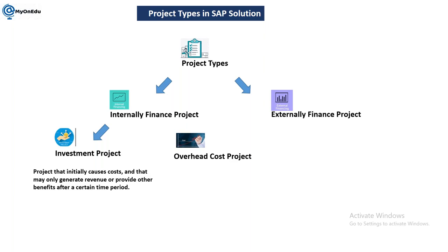When we are understanding whether this project will be successful or not, it is based on some factors. You will calculate the NPV, you will calculate the payback period, you will do complete pre-investment analysis, ROI, and only then will you say, yes, this project is useful for us. In this kind of project, you will not have any customer, no initial revenue, and here periodic capitalization. So in finance terms, whatever amount we put into the project has to be considered as an AUC, asset under construction.